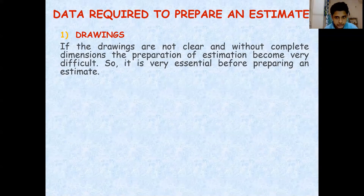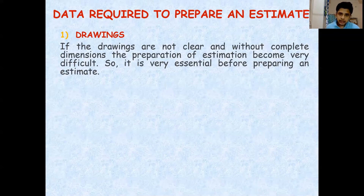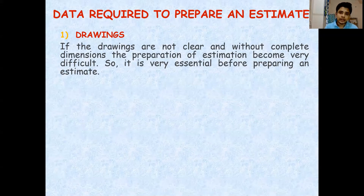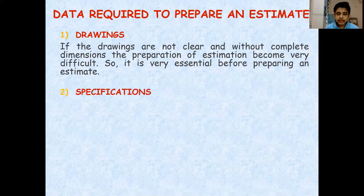From the drawings we take out the length, breadth, and height, and we find out the volume of work. Then we proceed to find out the requirement of materials, and multiply the quantity of materials by the rates to get the cost.